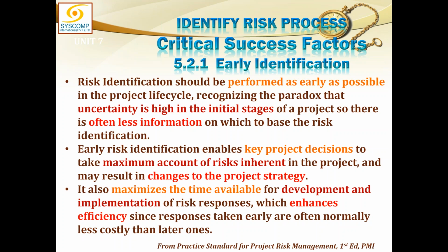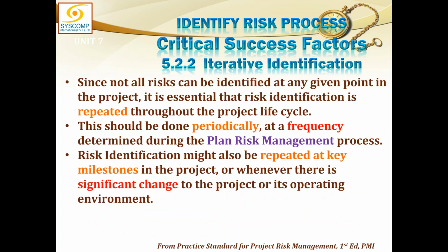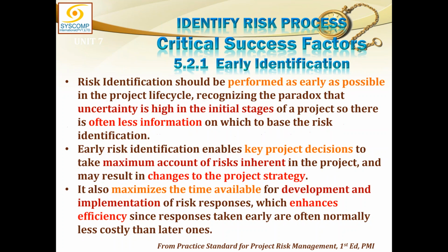It also maximizes the time available for development and implementation of risk responses, which enhances efficiency, since responses taken early are normally less costly than later ones. So the first one was about early identification. This is to support the cause: identify the risk as soon as possible. So early identification is the first critical success factor in the identify risk process.